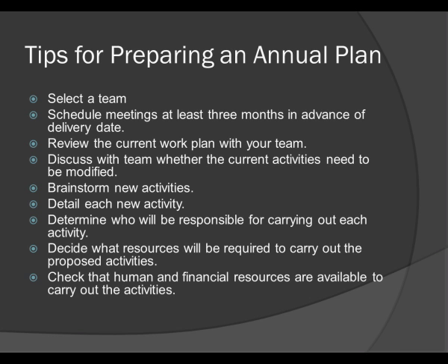Your work plan should describe all the activities that must be undertaken in the first year to meet the goals and objectives of your project. The work plan should indicate the activity, when it is scheduled to occur, and who will be responsible for it. It's also helpful to note the resources you will require for each activity, as this information will be useful to you at a later date for preparing your program budget.